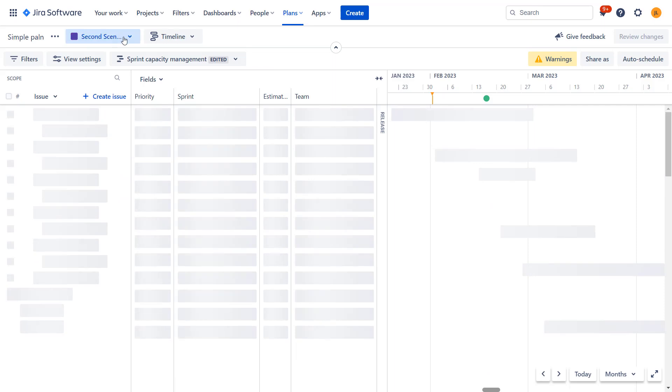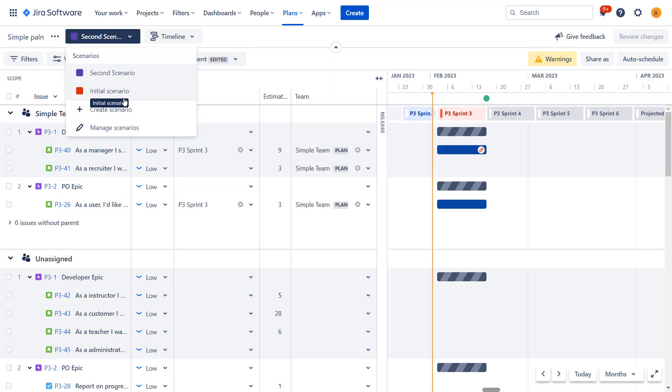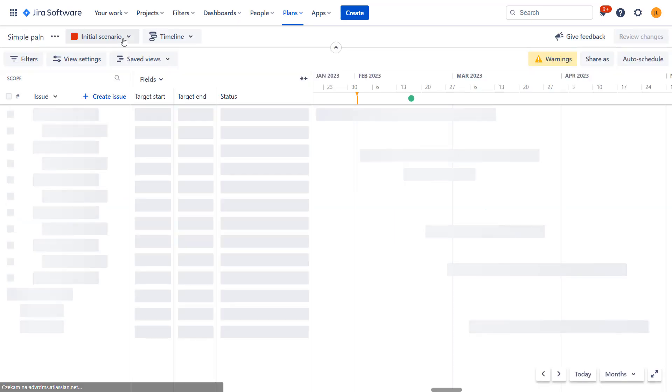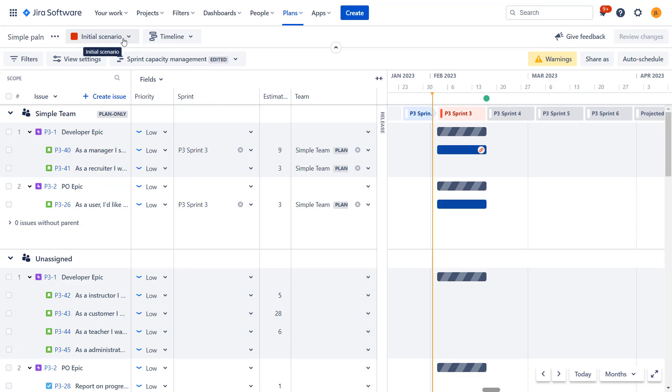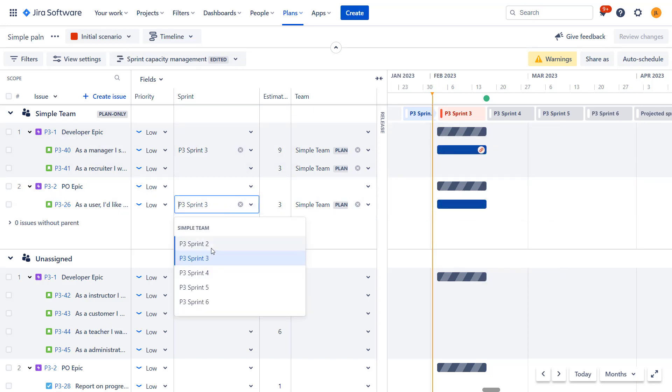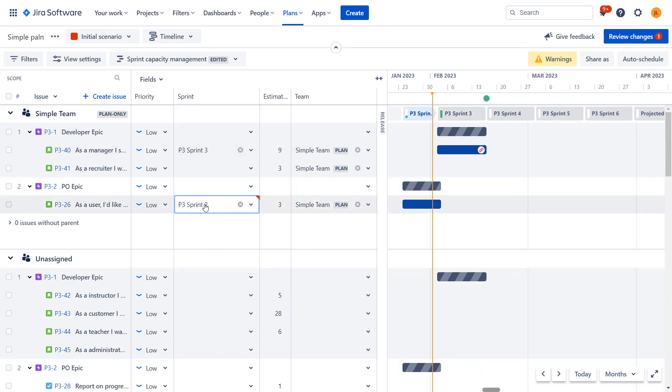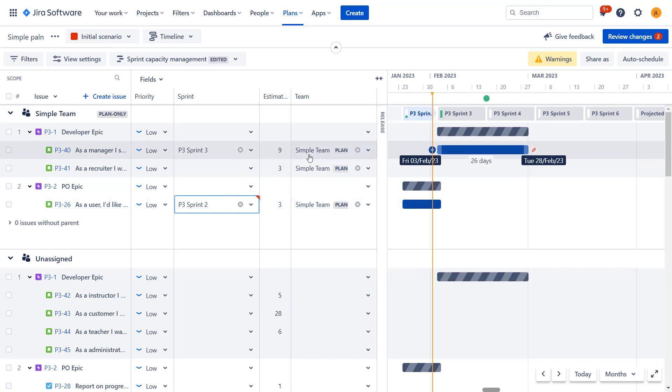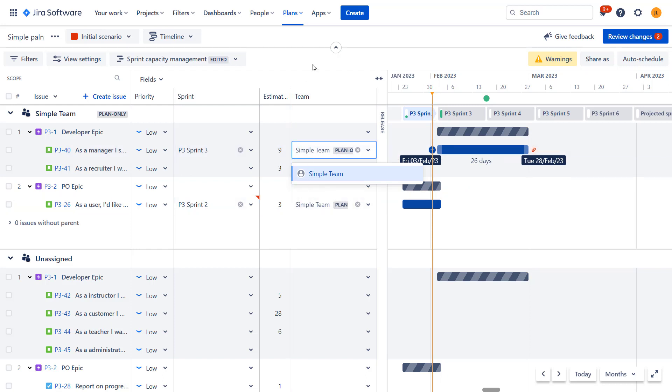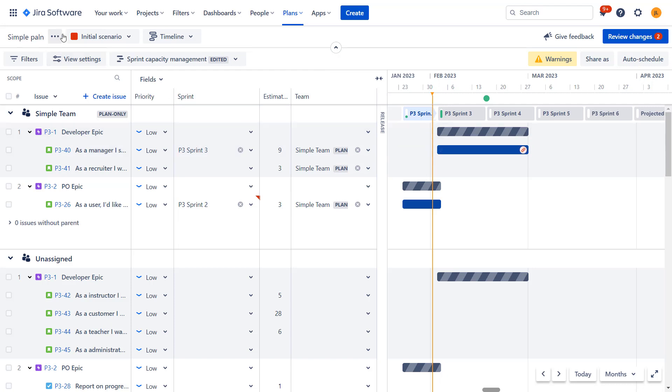We can decide what this scenario should copy or what should be the initial plan in this scenario. So I'll just have a copy of this initial scenario. Let's create it. Now you can see that I can pick or switch between those two scenarios, but what it actually gives us, what it allows us to do. So you will see that I can edit my initial scenario so I can change it here. Sprints, I can change dates, I could assign tasks to different teams. Well, in this plan there is only one team, but I can do all the changes.